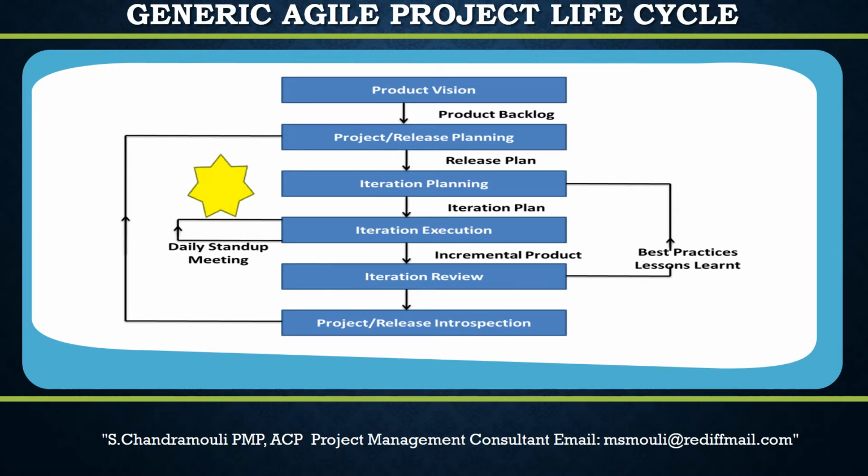Take advantage of your on-site customer's presence to ask about the detailed requirements for each story. What do the customers expect when the story is done? This will make the acceptance test criteria for your iteration, and is the most important piece for getting the customer sign-off.